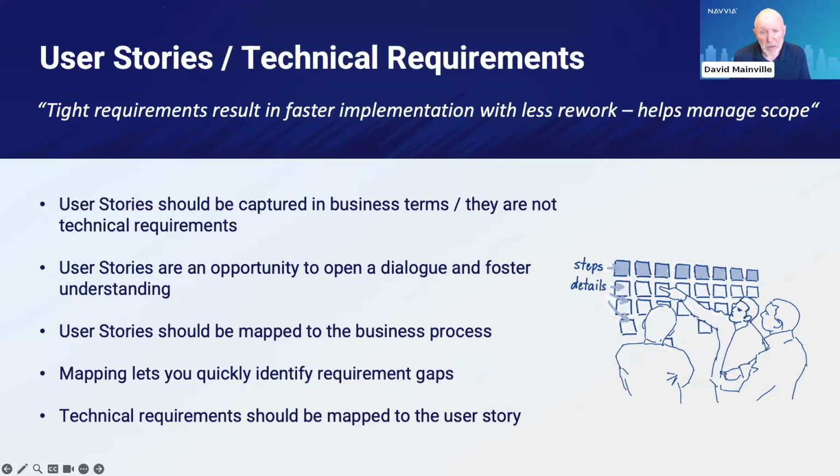And one of the things that we were able to do is get to the point where we fixed priced our work. That's kind of unheard of, at least from my experience these days. And the reason we were able to fix price the work, go into a bid and say, this is how much we're going to charge to implement the tool, is because we did our homework. We had the processes defined. We had tight requirements. And by having those tight requirements, we were able to estimate with a lot of clarity what it was going to take to implement the process in a tool.